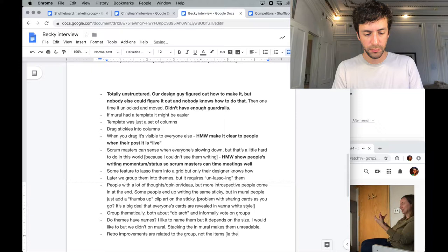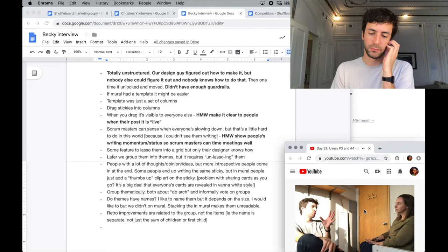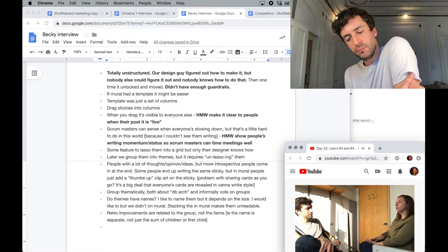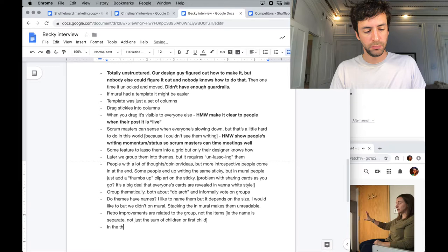So that's why a lot of times with the grouping, it's nice to see everything, but a lot of times it's the recontextualization: we're saying this is really about this, we all agree, yes, okay, it's now that. When you have that third tier, that second or third group of things, do you rewrite post-its, or do you just grab the best ones and put them over there? Well, neither. I guess we rewrite. We leave all that raw stuff raw, and then we make either a new post-it or a text box. Hold on, let me make sure I understand the question.